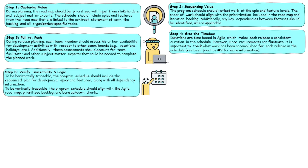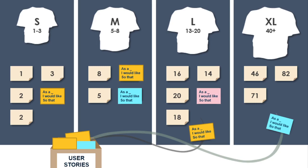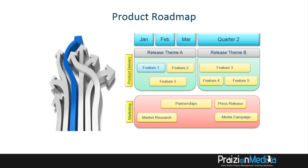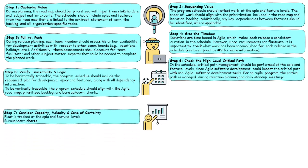Number five: verify traceability and logic. To be horizontally traceable in the world of Agile, you want to trace at the higher levels — does it make sense seeing how the features are sequenced, how the releases are sequenced? To be vertically traceable, the program schedule should align with the Agile roadmap, prioritized backlog, and burn-up or burn-downs. Number six: check the high-level critical path. The critical path at a much higher level — in the product roadmap, we have those bars like we do in Gantt charts, but at a much higher level. For an Agile program, the critical path is managed during iteration planning and daily stand-up meetings. We do not use the functionality as we would in MS Project. Number seven: consider capacity, velocity, and the cone of uncertainty.